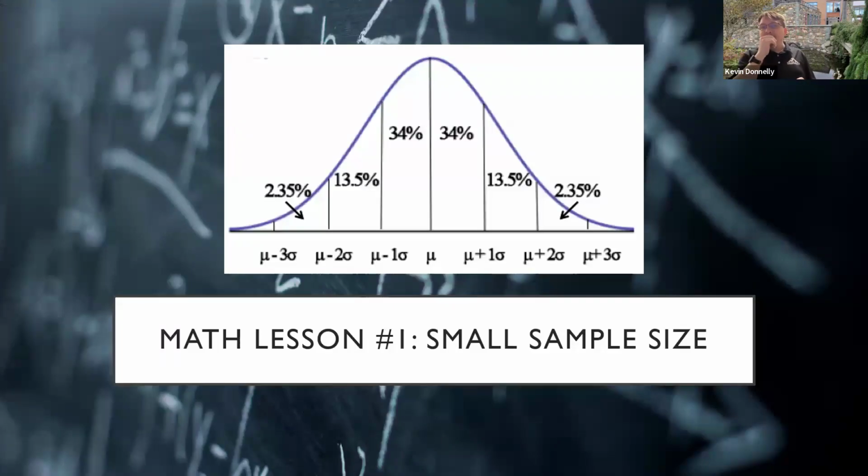But one of the challenges, and this is math lesson number one when it comes to engineered soils, is that in a perfect world, in order to get a statistically significant test, right, to know what the actual true average is, because if I go into a field of topsoil, it's going to vary all around that topsoil field, the exact sand, silt, and clay, the exact pH of that soil. These are naturally varying products. And so ideally, I would do 5 to 10 samples in order to say, all right, this is the average, this is the range we have. But both with time and money, that's not doable. So what most things end up being is you do one test, you assume it's the average, and you go with it. And so the challenge becomes, if you need to modify it, are you modifying the average?